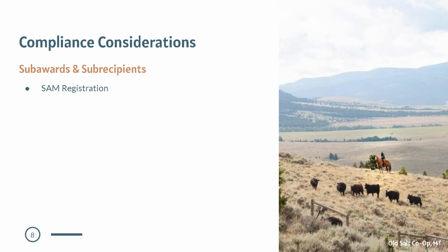For each subaward, you'll need a subaward agreement signed between you, the award recipient, and the subawardee organization. If your grant spans multiple years, it's a good idea to sign an agreement annually that includes the deliverables the subaward is responsible for, what you'll provide to support the subawardee's approved budget, and details about the payment process and invoicing frequency. Before finalizing your subaward agreements, take a look at your performance report template. You'll likely need data from your subawardees to complete these reports, so it's smart to include the specific data you need them to collect right in the agreement.